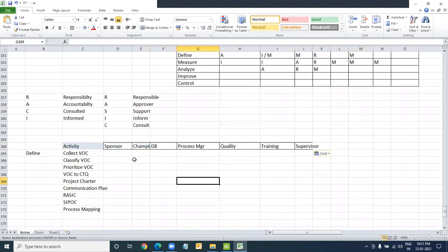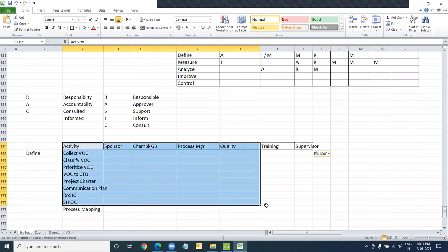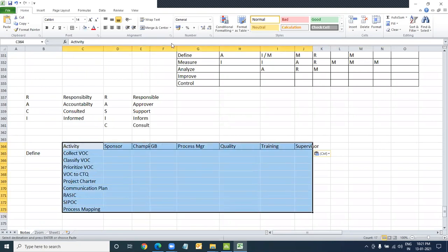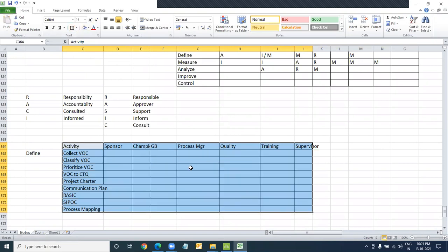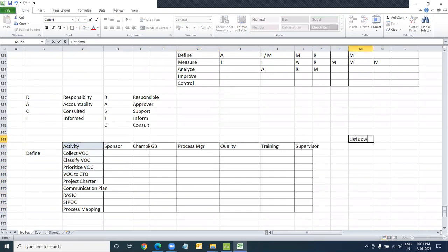Now, an activity, we do process map. Yeah, so we're not doing the process map. We're just giving the responsibility. So everyone is sitting in the room. We're trying to have the relevant stakeholders here. Everyone is here. We can discuss. First, we list down all activities at task level. So you've done that. Now you put them in the right sequence as they're supposed to be done. So that's what we have done. A sequence has been created. Now we just need to find the right candidate.